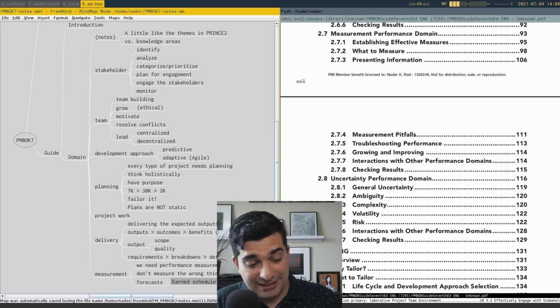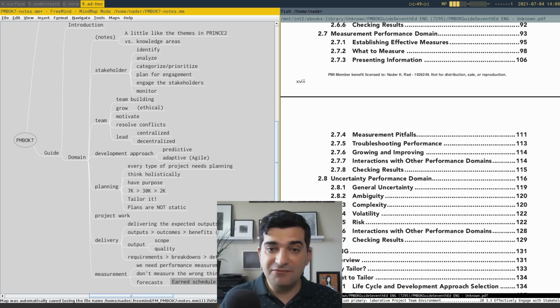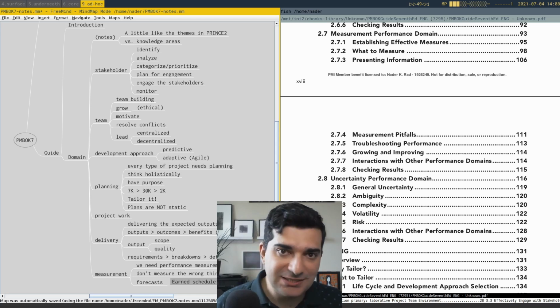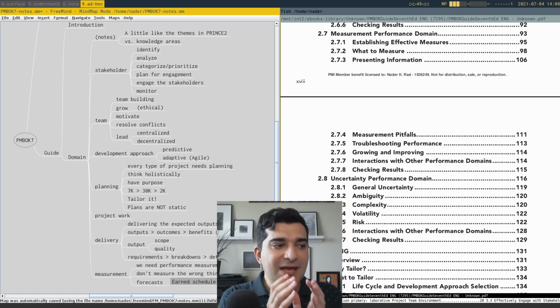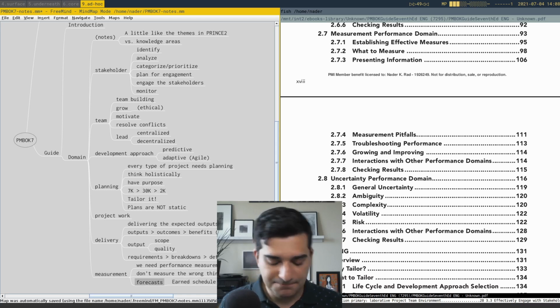And by that, I mean that it's even harmful to do that, because then you're pushing everyone in the project to be focused on having 100% completion for that. And then you will have the Parkinson law, the student syndrome, and a lot of other things that will reduce your productivity. So focus on what you want to get.